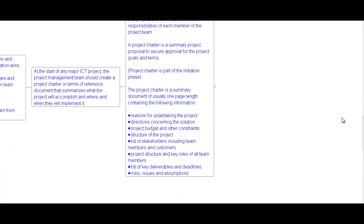The project charter is a summary document of usually one page in length containing the following information: the reason for undertaking the project, direction concerning the solution, project budget and other constraints, the structure of the project, list of stakeholders including team members and customers, project structure and key roles of all team members, list of key deliverables, deadlines, risks, issues, and assumptions.